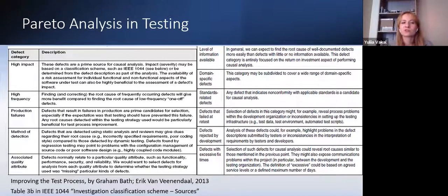But it's very important to find the right category, the right factors, I would say. Because in some examples, you probably wouldn't see this 80-20% rule, this principle. So if you don't see it, please try different factors, try different categories. It means that on these factors, it doesn't work as you want.